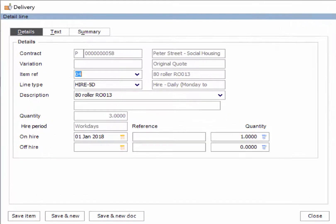Construct uses the hire period type, the on hire date and the actual system date to calculate the hire quantity. In this example you will see that a plant item has been on hire for 3 working days.